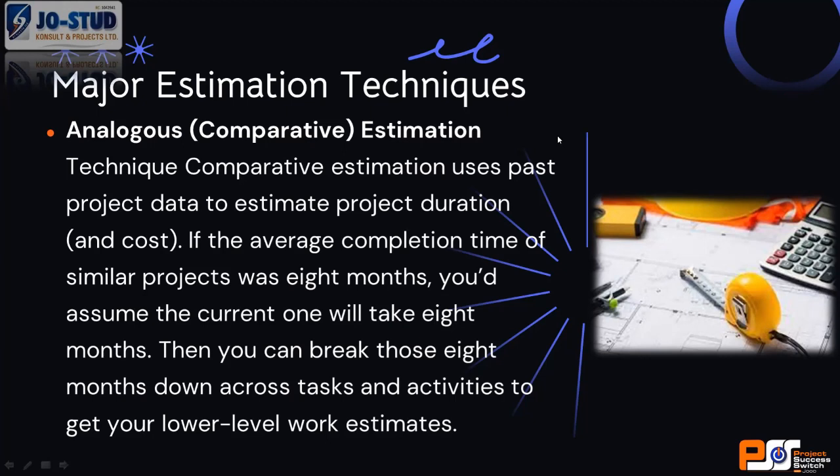But then I was selling this bag at 2,000 per kg. But now it is 2,400 per kg. So automatically there's a 20,000 on it. That's analogous estimate. This is before you get to site to go and take your physical measurement. It's good, you just have a rough estimate.